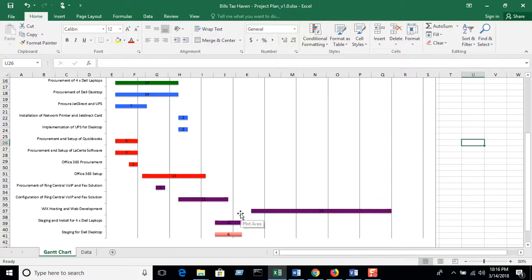And because the customer didn't have a huge priority on the web page, just creating a web page from scratch, depending on how much customization he may want, could take up to about a month. Because if you have 20 pages on it versus 3 pages, this was just a guess. In reality, we would have had a whole different requirements gathering session about the web page itself, and that would have taken several days. But you already see that this little scenario has taken a long time to get to this point.